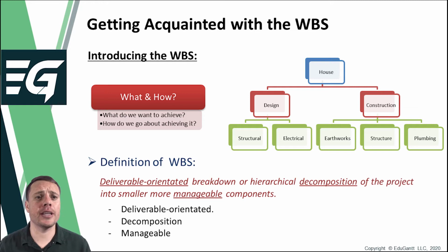The work breakdown structure is created in order to ensure that all project activities are identified and defined to the extent needed to ensure that they will be correctly executed by the project team and to ensure that none of the activities will be missed. In essence, it acts like a traceability document for the project activities, which is later used to monitor and control the execution of the work.